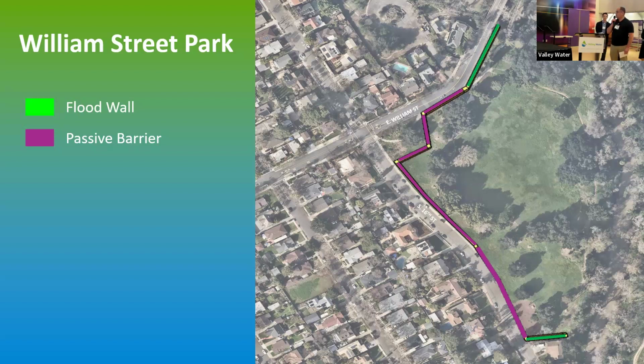We've got a beautiful bay tree on 16th Street that would have some impact from the wiper wall excavation. We're having Valley Water look at that very carefully. The construction contract will zone with an arborist the areas where no vehicles can roll around the trees, so we have no compacted roots. And Valley Water has agreed to put in their spec that there will be monitoring of the trees into future years. So if you see any signs of stress, like oak trees starting to get leaves on their bark, we've got a response very quickly on how to deal with that. I see a follow-up question here.